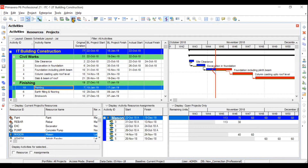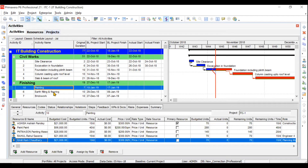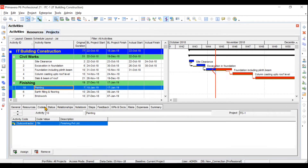We will also check resource leveling and then move to activity codes and resource codes. These are used to filter out certain kinds of activities. First you create your resource codes or activity codes, then assign them to activities, and then use the filter, grouping, and sorting options.